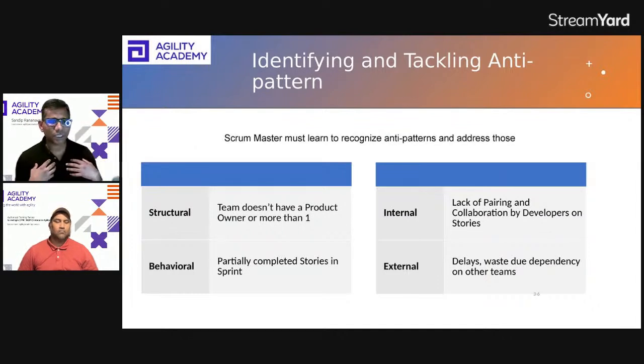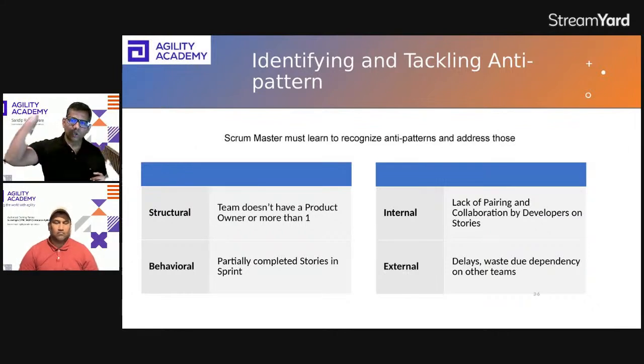In SAFe, if you ask me, tech debt is treated as an enabler, and that enabler can be at any level. Quickly, Warren, if I just explain the taxonomy in SAFe, you have an epic which goes across multiple quarters. There is no time box, it is a significant initiative. So your enabler can reside at that level. At one big bank where I did agile coaching, they had multiple enablers ranging over several years.